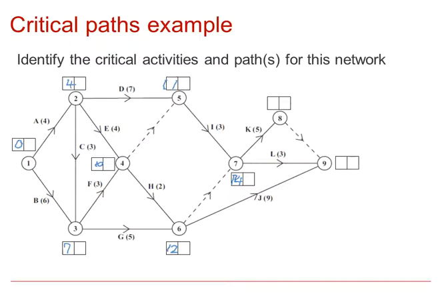Node 8 will become 19, and then 14 plus 3 would be 17, but I have a larger 19, and a 12 plus 9 is the largest, which is 21.